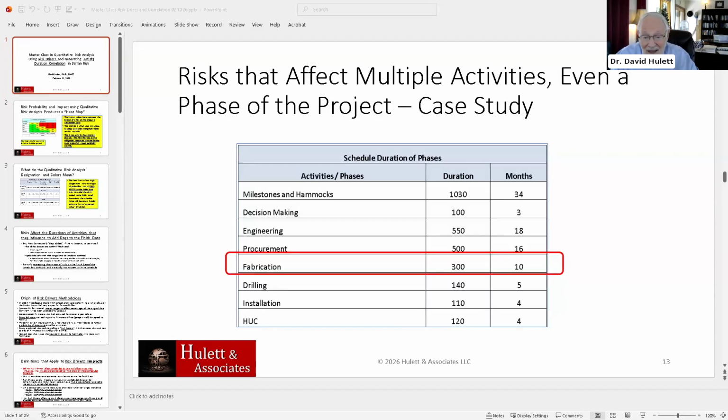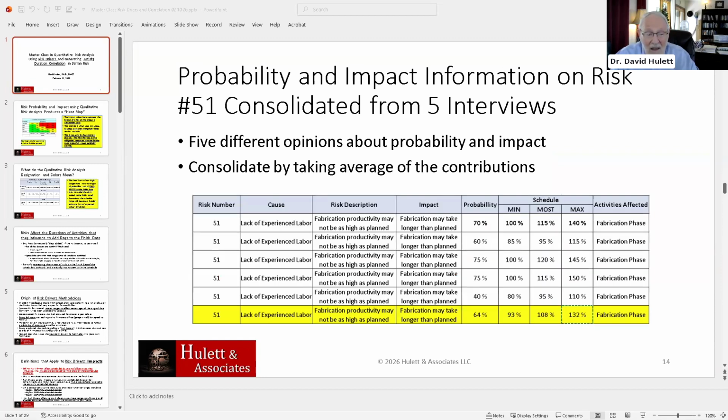By the way, we're asking a number of people this. The first person, there were 50, this is an Excel spreadsheet. There were 50 activities in the risk register, and they're all available to any individual who comes into these risk interviews. I will tell you, we asked them to come in with 5 risks that they really want to talk about. And often those 5 risks are not anywhere to be seen on the risk register, but they're highly excited about those risks.